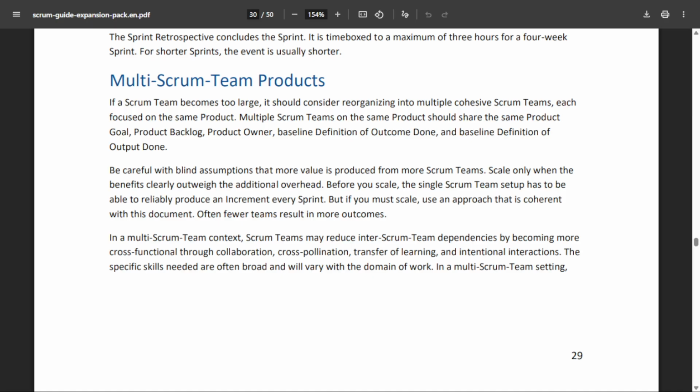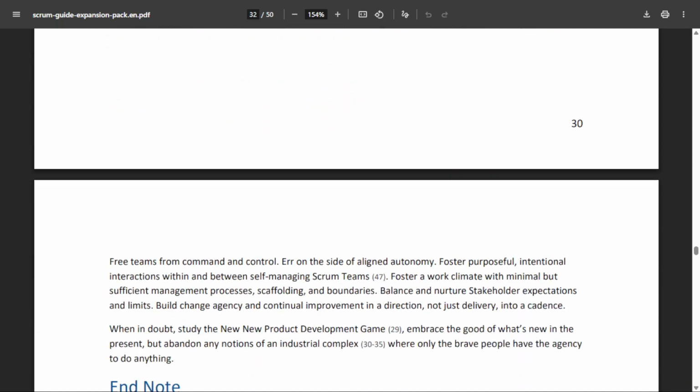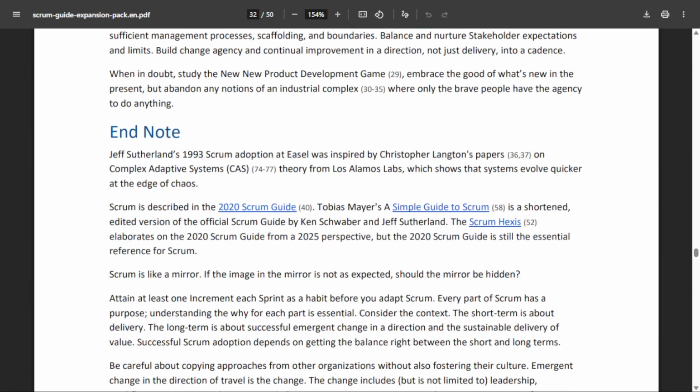So here we talk about when many teams work on one product, they should align on a single product goal and vision. And then we should manage dependencies intentionally. We should ensure increments integrate seamlessly to avoid many waterfalls, and we should use coordination forums, but we should avoid bureaucracy. And that is all here, page 30, and all the way down.